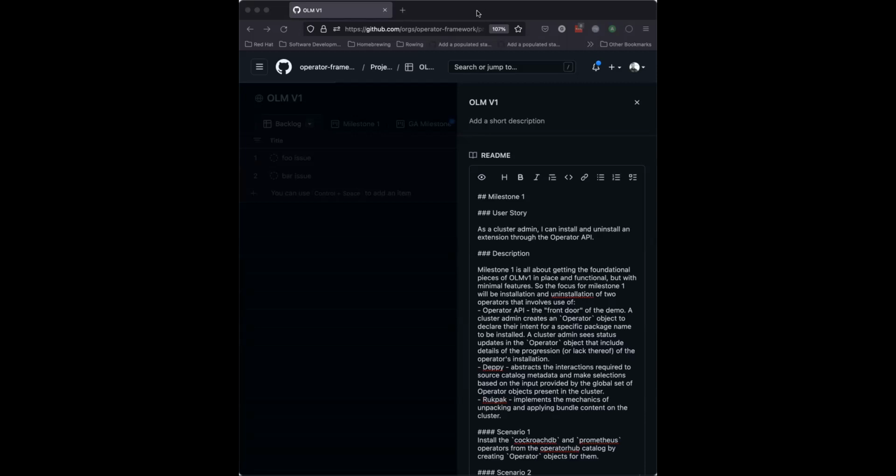All right, so it definitely seems like what we're suggesting is that there needs to be a way to collect feedback on milestones as they get released. I think that's something we can track as a ticket in milestone 1, as a release criteria. So perhaps we create a ticket and assign it to someone to lead that initiative, simply because what that process looks like might take a little while to decide. So I don't necessarily want to get stuck on this issue here, if that makes sense.